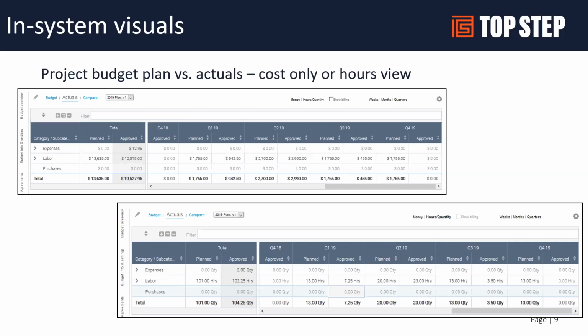So we can see how each quarter or each month the planned hours lay out across our project. And then I can see each quarter, each month, how the actual hours come in against that budget. And do the same for costs. So if you have labor costs and expense costs that you're expecting, you can go out and put those in when you expect those expenses or labor costs to hit, and then that will allow you to use this. And this becomes ultimately very reportable.